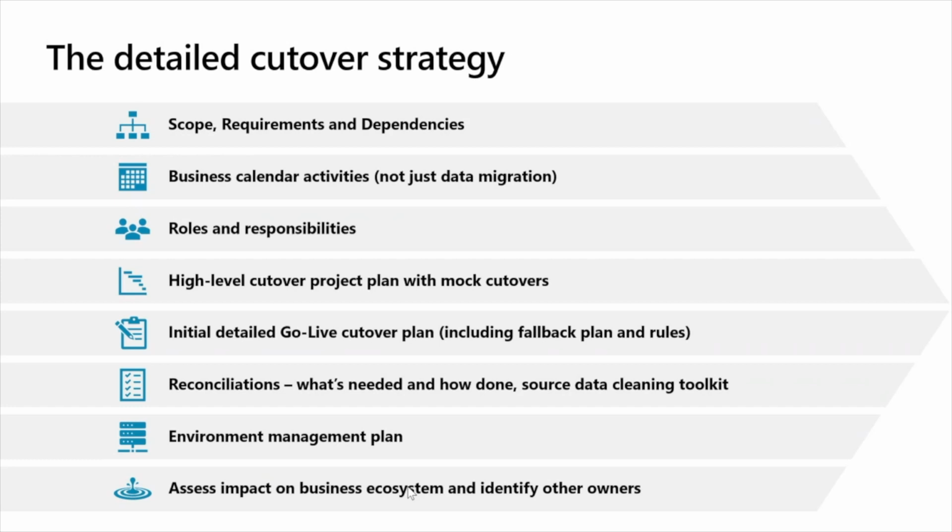A cutover leader is somebody from the business who is pulling all the threads together, but they need to understand what their role is compared to the role of the data migration lead. What is their role compared to the role of the project manager? What is their role in comparison to the role of the business sponsor? So having that definition early on helps to make sure everybody understands where their responsibilities lie and where the overlap exists.